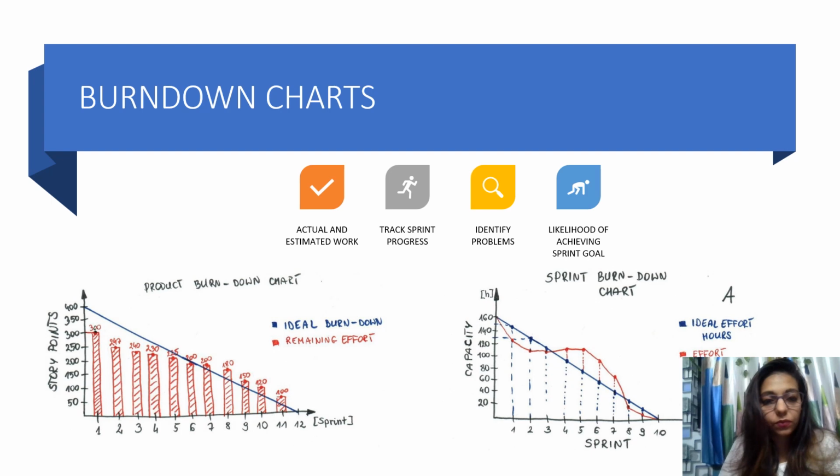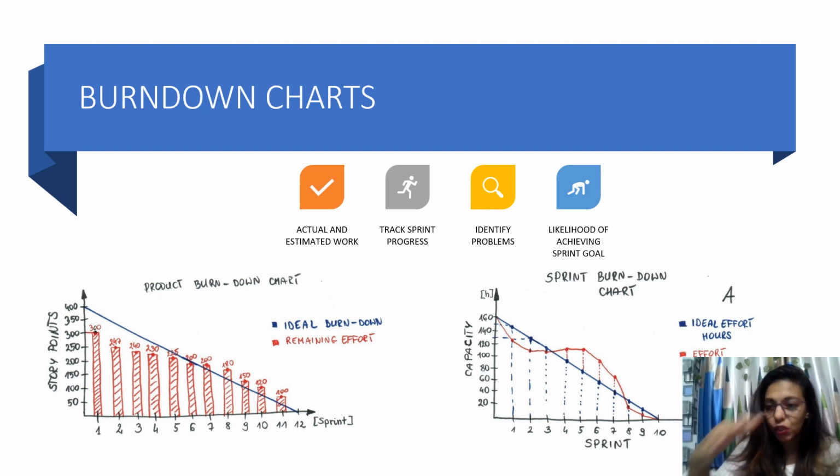Now moving here, for day one we have completed maybe 300, so how much is pending? Day 2, this is what we have completed, day 3, day 4, and then at the end we should have no story points left. So what is this showing? It is showing how much of the remaining task we have in our bucket. If we have completed 300 and our target is 400, we have 150 remaining. As it goes, it will have a slope downward.